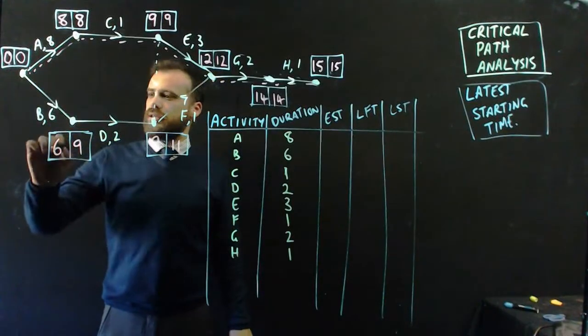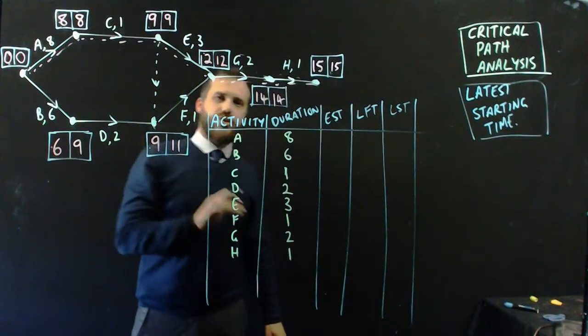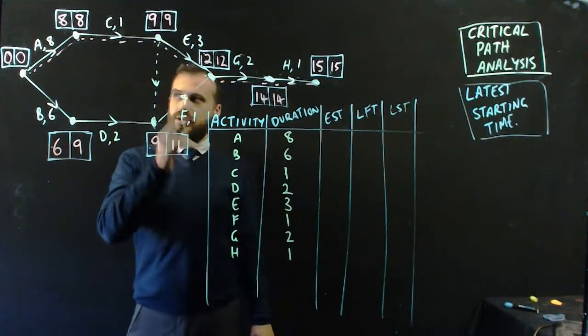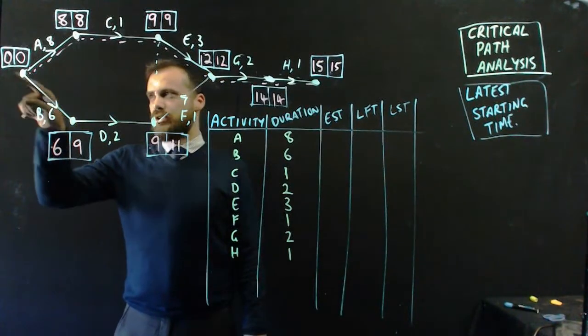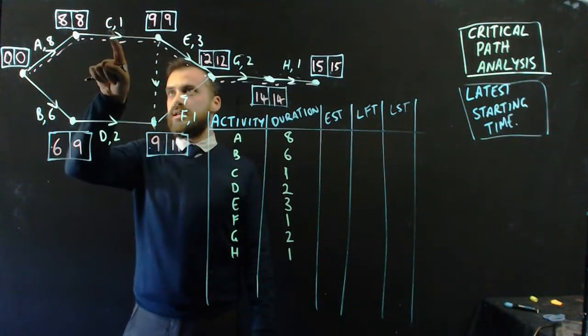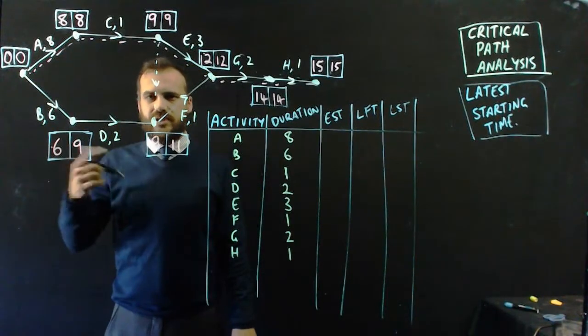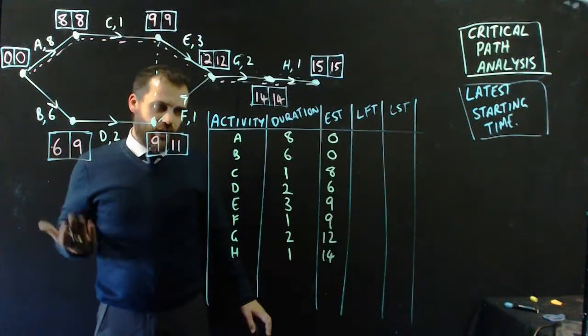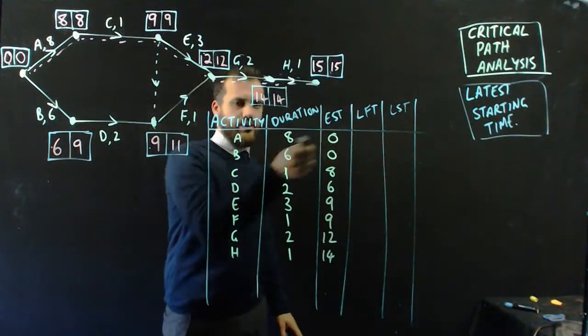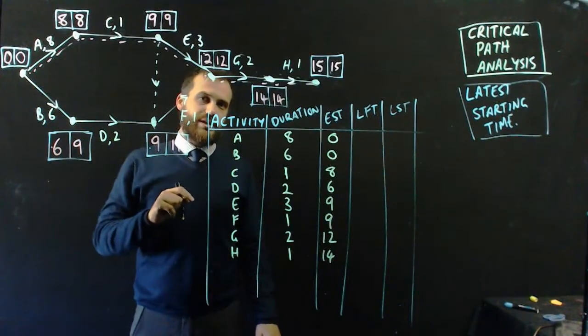Here, here, here. The left-hand side boxes tell us the earliest starting times for the activities. Now, you need to be careful here because A and B have the earliest starting time of that number there. C has the earliest starting time of that one. So it's the box that precedes the activity, the vertex before it. All right, let's fill that in. So far, so good. These are the earliest that these activities are allowed to start.